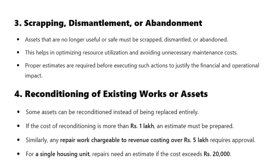Category 4: Reconditioning of existing works or assets. Some assets can be reconditioned instead of being replaced entirely. If the cost of reconditioning is more than ₹1,000, an estimate must be prepared. Similarly, any repair work chargeable to revenue costing over ₹5,000 requires approval. For a single housing unit, repairs need an estimate if the cost exceeds ₹20,000.